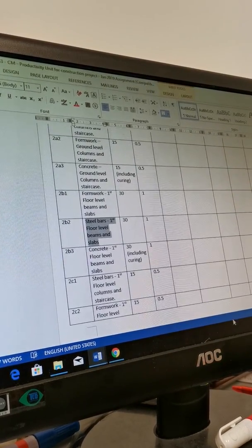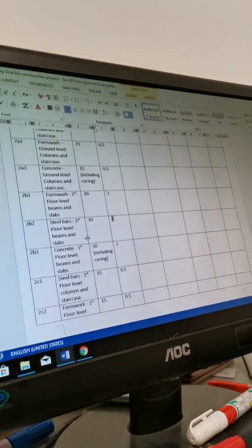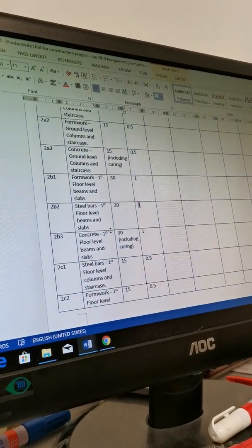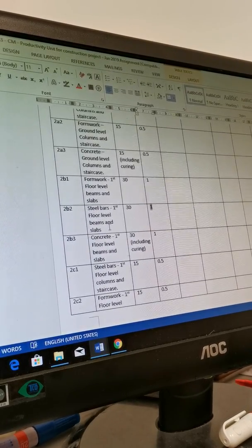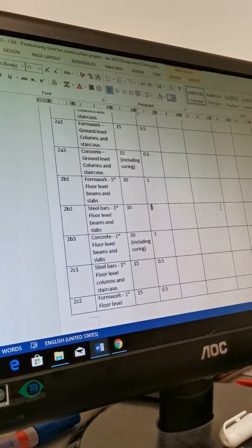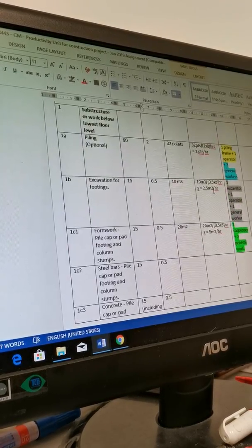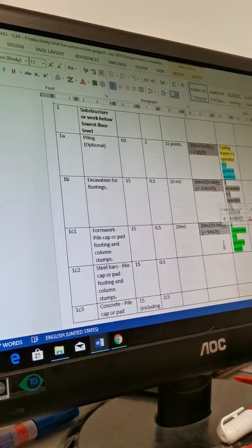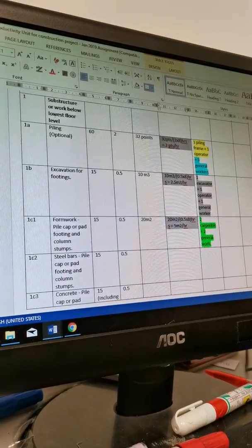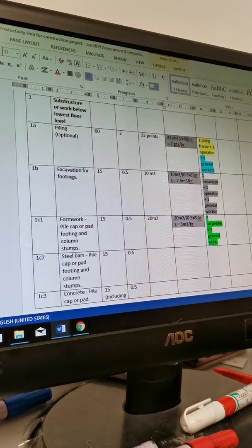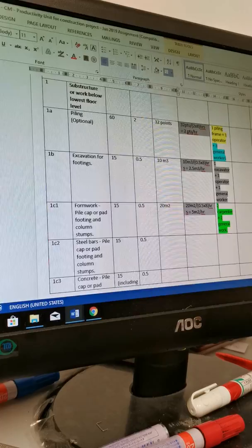But the duration is here already. Last time you mentioned about the driving quantity is about this. Yeah, this is driving quantity lah. Okay? It's whether you want to combine or not combine. If your planning is this method of construction, then you combine the quantity. The quantity will only help this one to determine this one only, the productivity. This one only. Clear? It's for your future reference. This is a combined one. This is the productivity rate. If you spread it out, maybe it's like a different figure. Okay? Because process is different already.